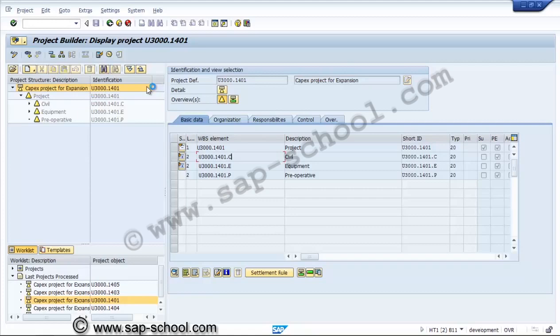If we have individual resource planning by WBS level, it will be better. So it is always better to create a network against a second level WBS element. Otherwise, if we feel we will have very few activities, we'll have only one network, which will be assigned at level 1.